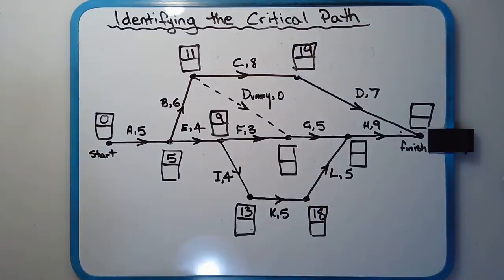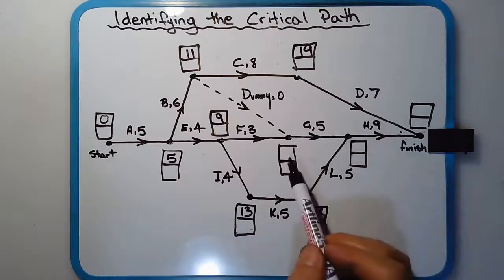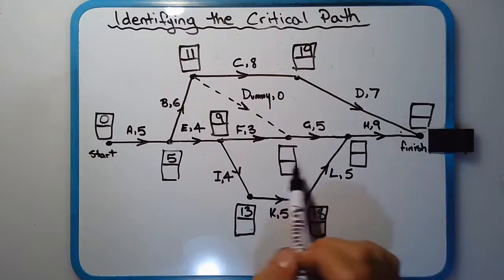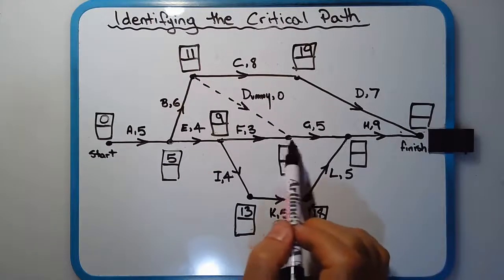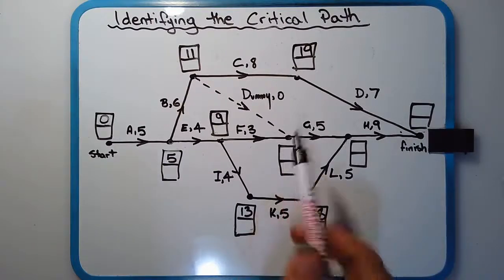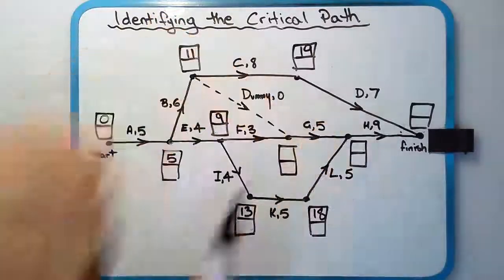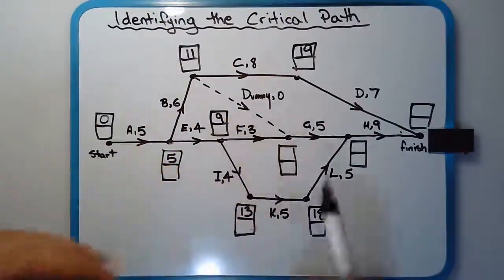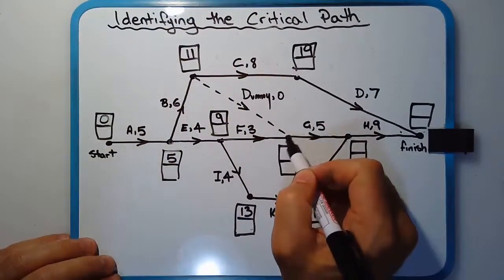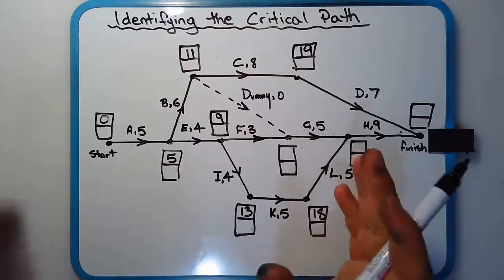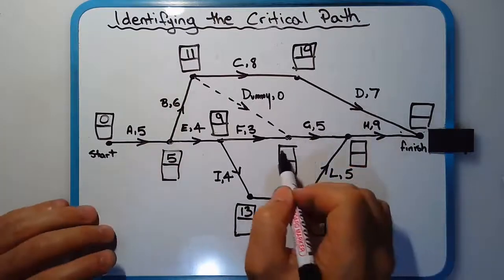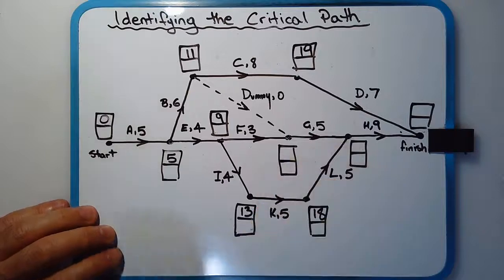Okay, so now at this point, the remaining 3 dominoes, so 1, 2, 3, are actually intersection points or vertices where two paths join or come together, and we have to choose the largest or the lengthiest path, and whatever the lengthiest path is, we'll write the number there.